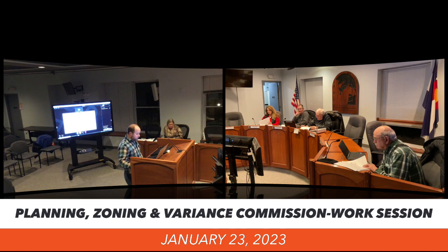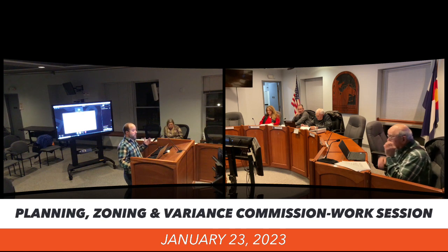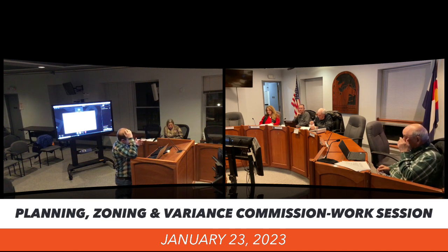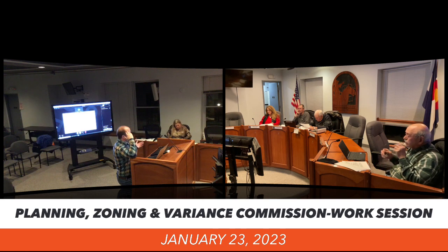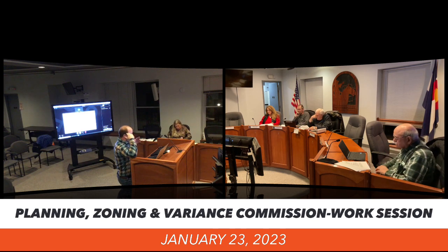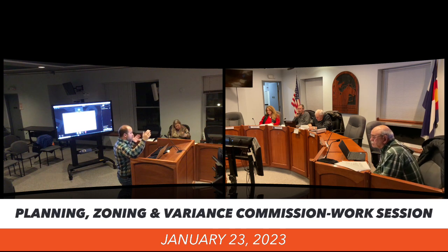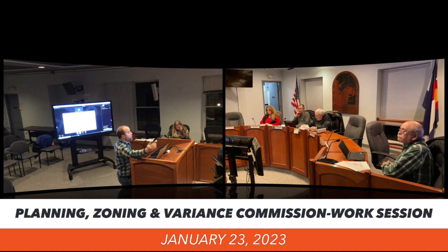All right, major impact. Here's the big one. This is number one, and this is the concept review. The city council has the power on a major impact to bring you in or not. If it's truly a major development, I've always seen the council bring in the Planning and Zoning Commission. That concept meeting is a very informal meeting where the applicant presents their application, and normally there's three or four questions that come from the city council or the planning and zoning commission. It was really the opportunity for the applicant to hear any major concerns.